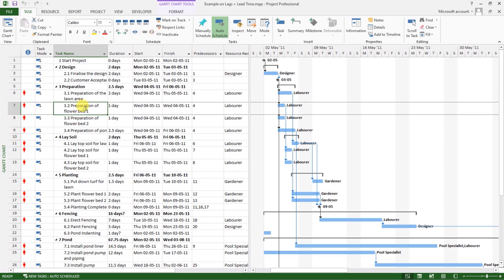So this means that if task 7 is critical, when you change its start or finish time, it is going to affect the overall project duration and the finish time for the whole project.